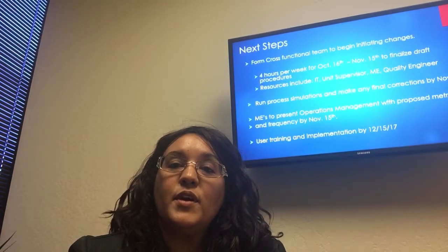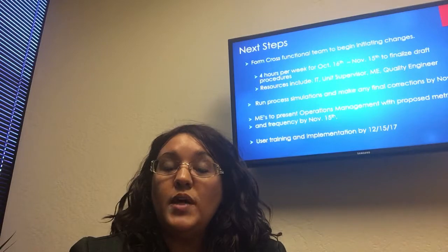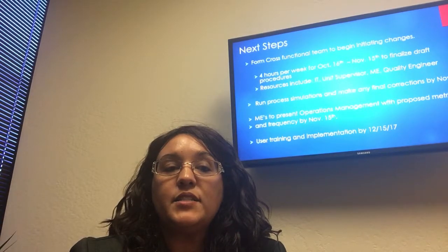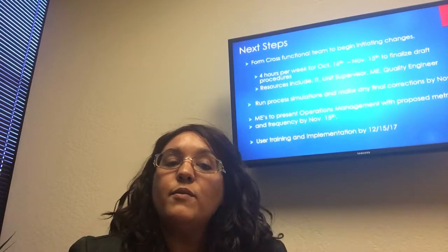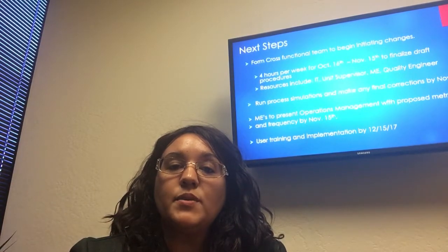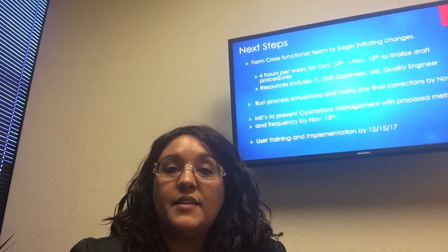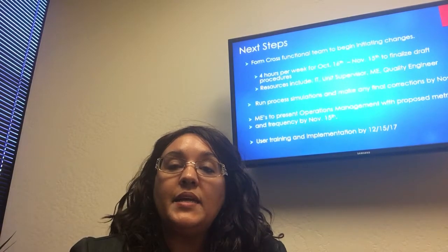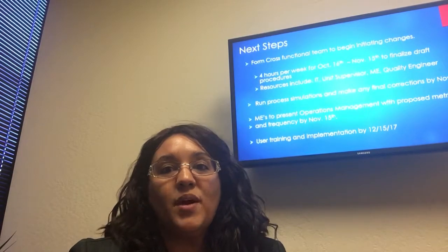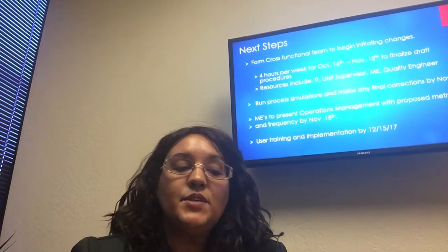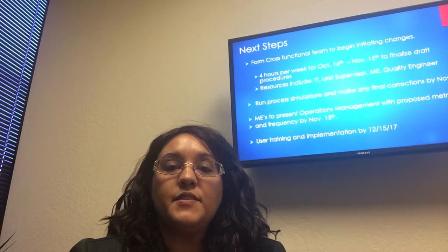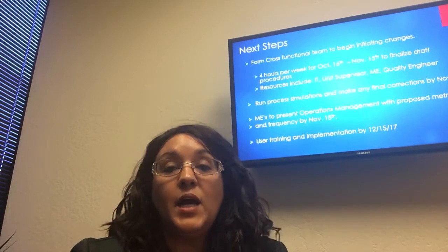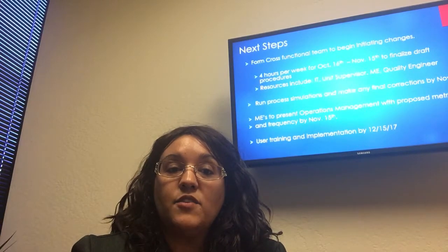So our next steps for implementing this project, we need to inform this cross-functional team and then begin initiating these changes. Right now we're looking at about 4 hours per week dedicated between October 16th through November 15th to finalize these draft procedures. The resources that we need is IT. Again, we want to look at the process, look at the system, look at the procedures, and they can help us fill in any gaps, and also help us identify what the data inputs and outputs are so we can have those documented as well.